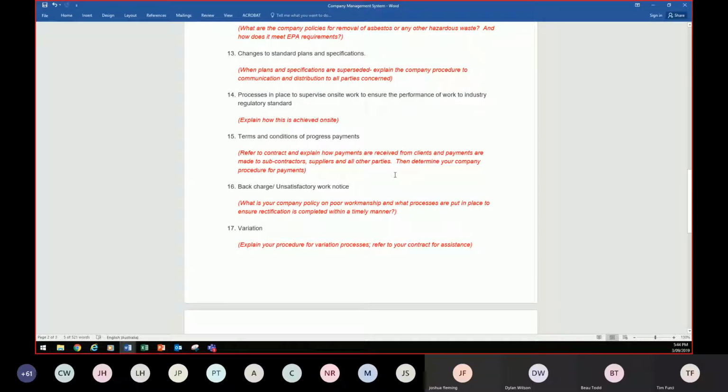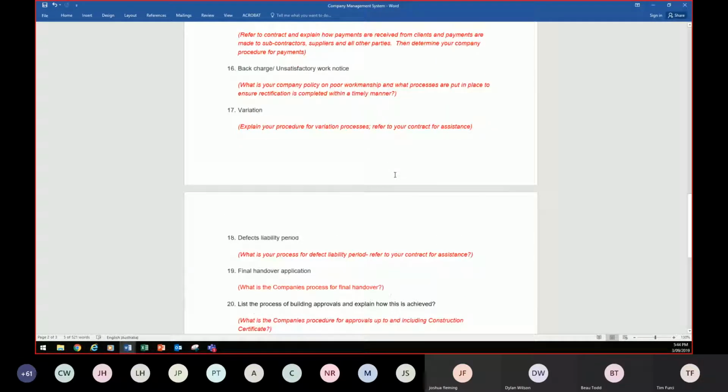They mightn't be able to wait till full payment, because they might do a little bit of work at the start of the job, then 3 months later they do a little bit more work, so they'll want some progress payments along the way.